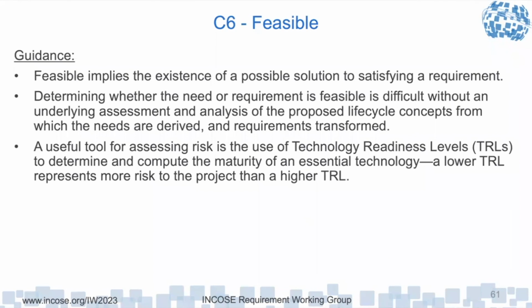The thing is, the lower the TRL, the more the uncertainty that you're going to be able to mature it sufficiently. And so the Government Accountability Office says on a government program, don't even consider a technology for use if you're not at least TRL 3, and you have to have a maturation plan such that you're at TRL 6 before you get to PDR.